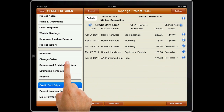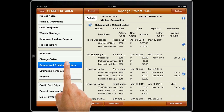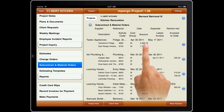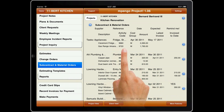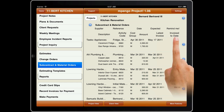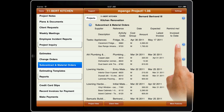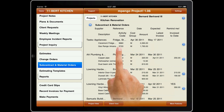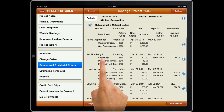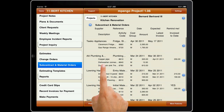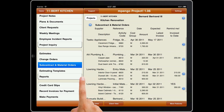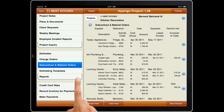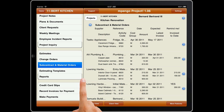Subcontract and material orders records your orders, keeps track of shipments and invoices, and reminds you of expected deliveries or completion dates. Material orders are even integrated with credit card slips to keep track of your deposits on orders.